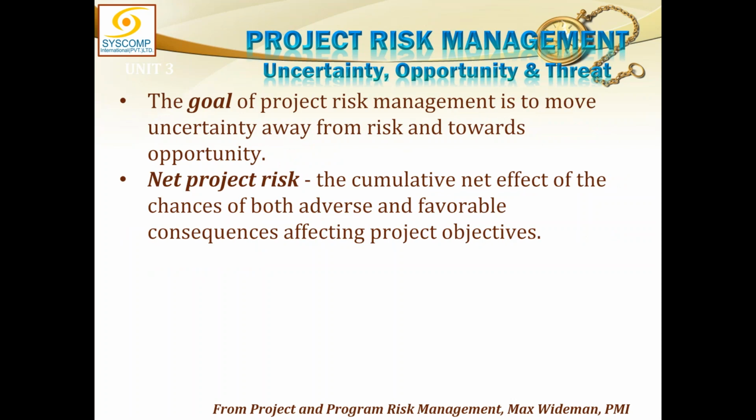The goal of project risk management is to move uncertainty away from the threats and towards the opportunities, as we said. And net project risk, I said total risk, overall risk. The project risk is the cumulative net effect of the chances of both adverse and favorable consequences affecting your project objective. That is the important thing: affecting the project objective. A risk is not a risk if it is not impacting any one of the project objectives: scope, time, or cost. If there is no impact on scope, no impact on time, no impact on cost, then it is not a risk at all. So this we must understand, and we will talk more about it.